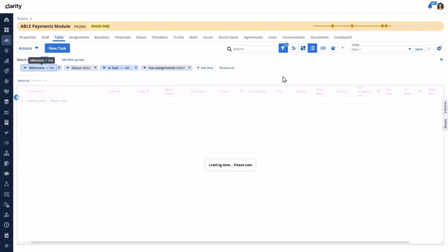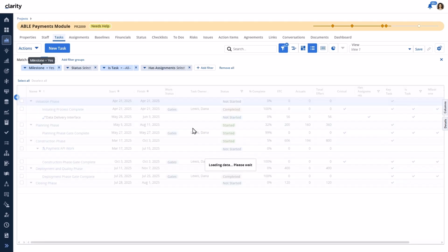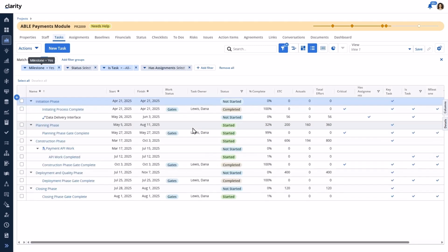The phase tasks are not milestones. However, they are returned when you do the filtering. When you expand all the tasks, you can now see in context where these milestones are located. And in this example, this particular milestone has a successor-dependent external task, and that external task is always returned when the local task is returned with the results.